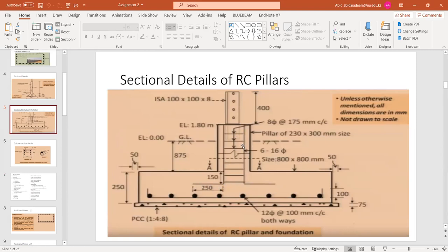So for those reinforcements to be placed over here, a parallel work on the preparation of these reinforcements has also to be started. So therefore, in this case, you will assume that all the reinforcements will be available in the form of these kind of cages for the columns and for the footings. These will be available. Otherwise, you have to schedule their work as well before starting the excavation, okay, before starting the excavation.